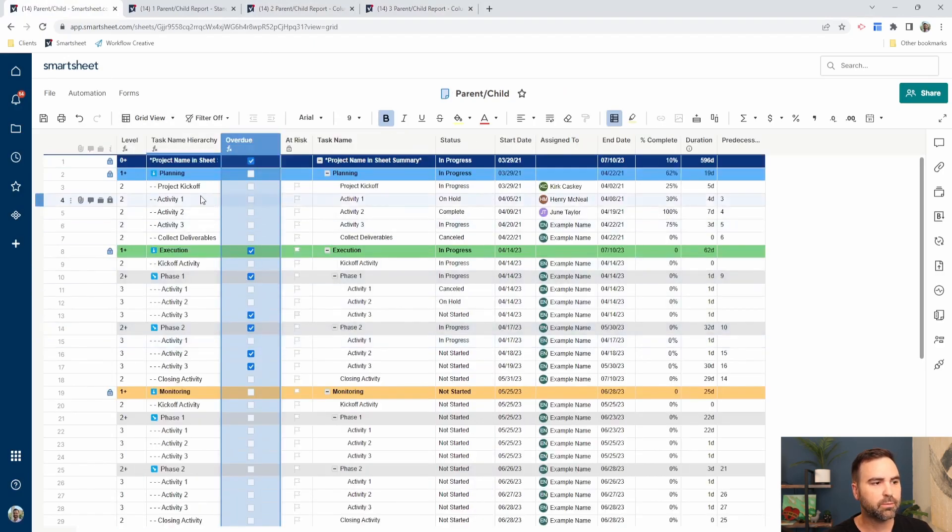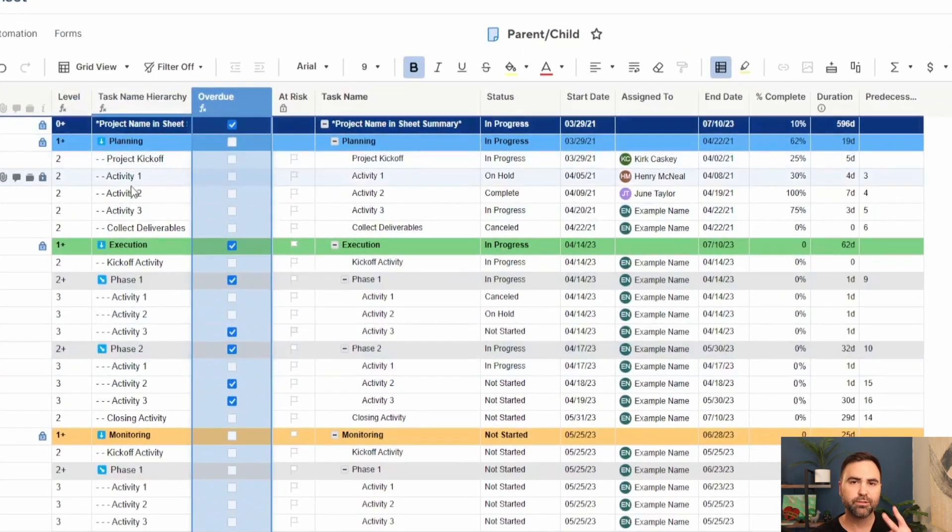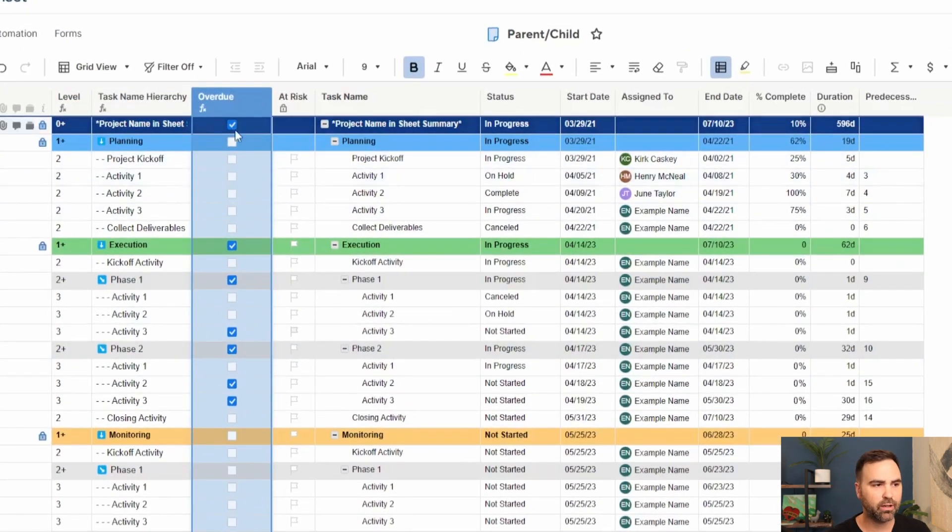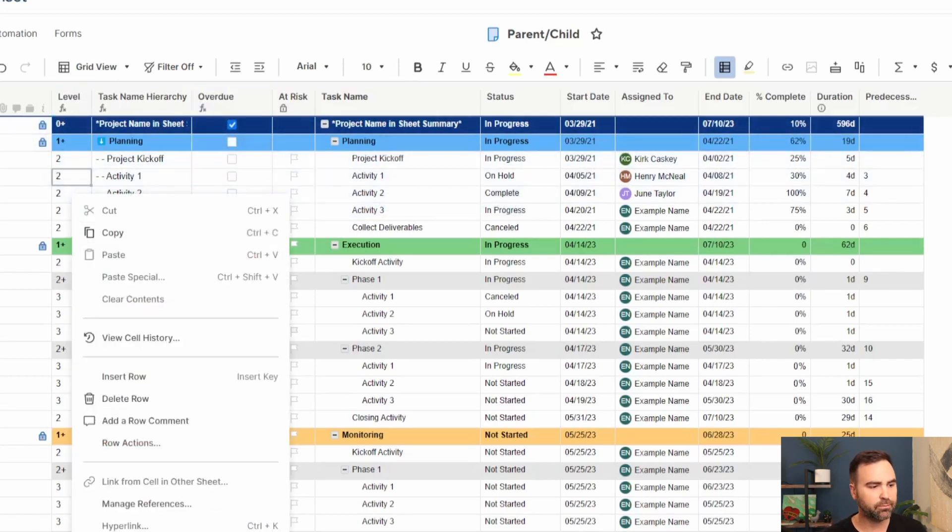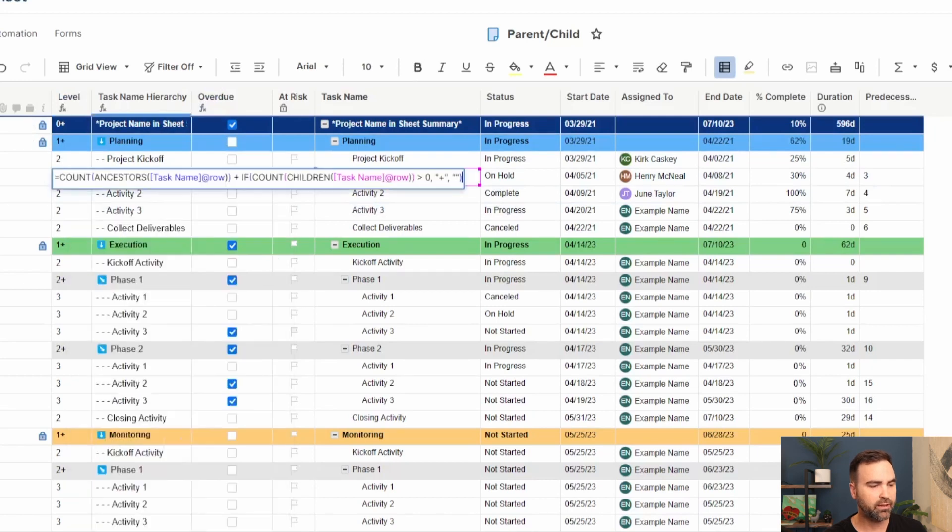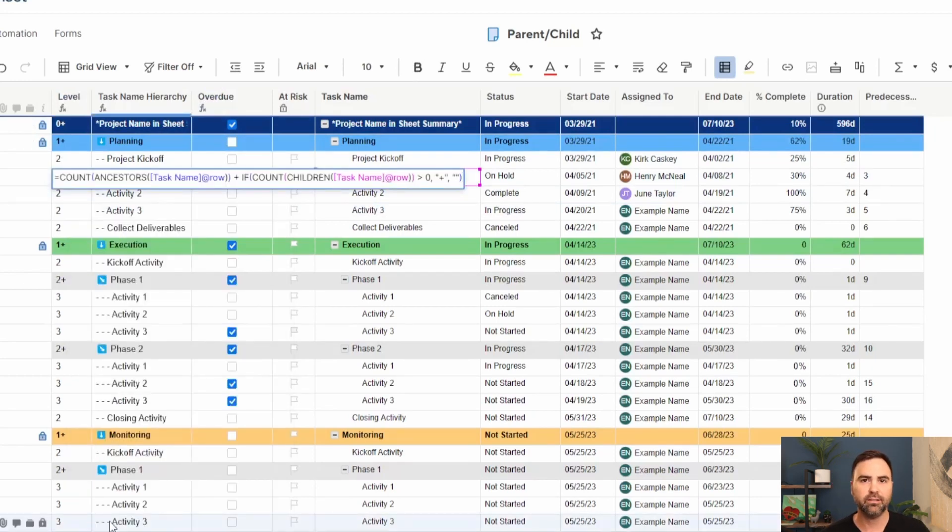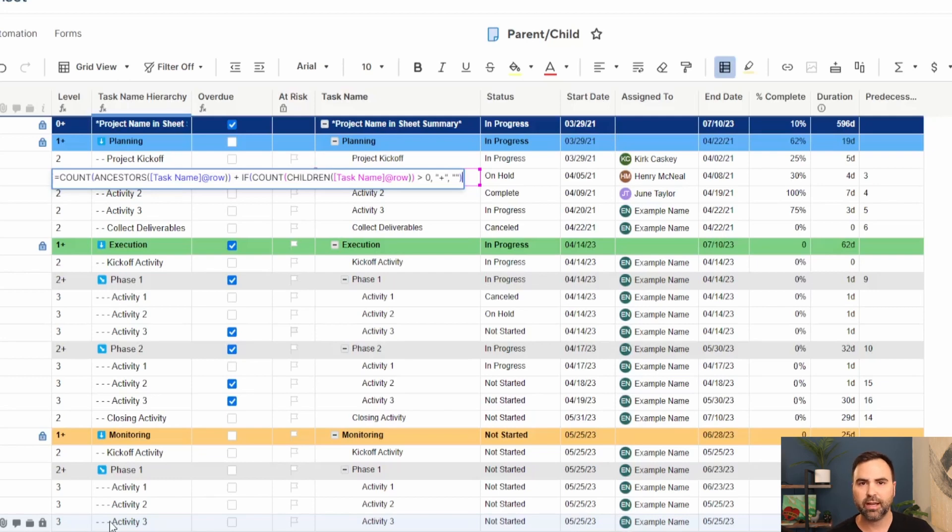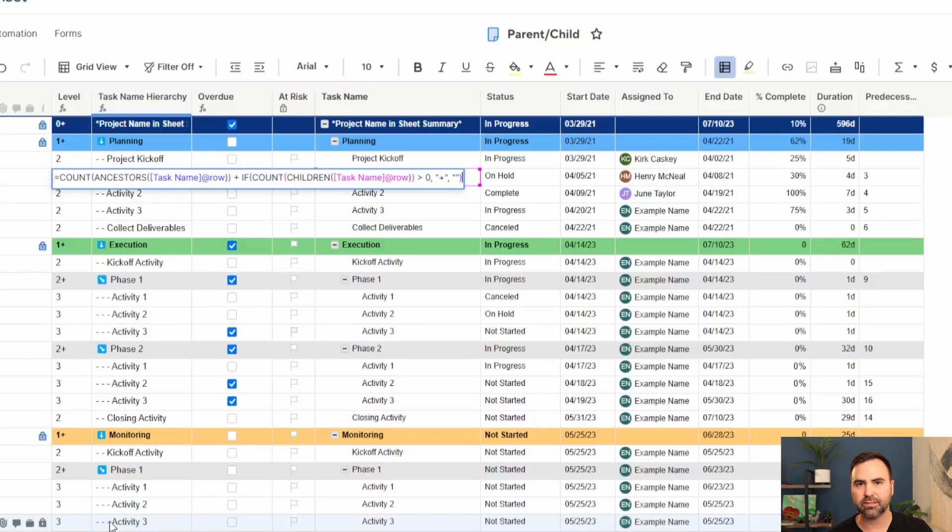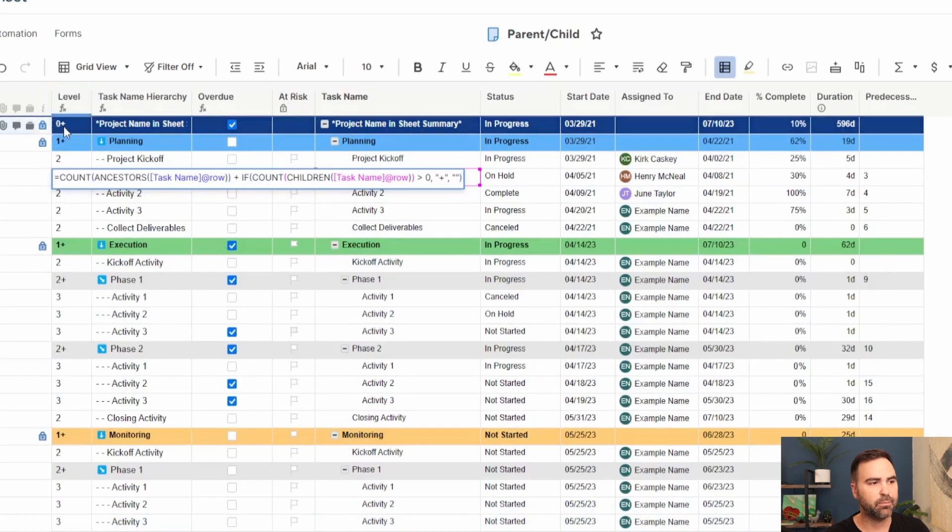Let me show you how this works in the sheet. I'm going to unhide my two columns here. I've built two additional columns in addition to our overview column. The first one is the level column. The level also has a column formula in it as well. And this column formula helps us determine at what level we are in the hierarchy or at what level the current row is in the hierarchy. The first thing it looks for is how many ancestors does the current row have.